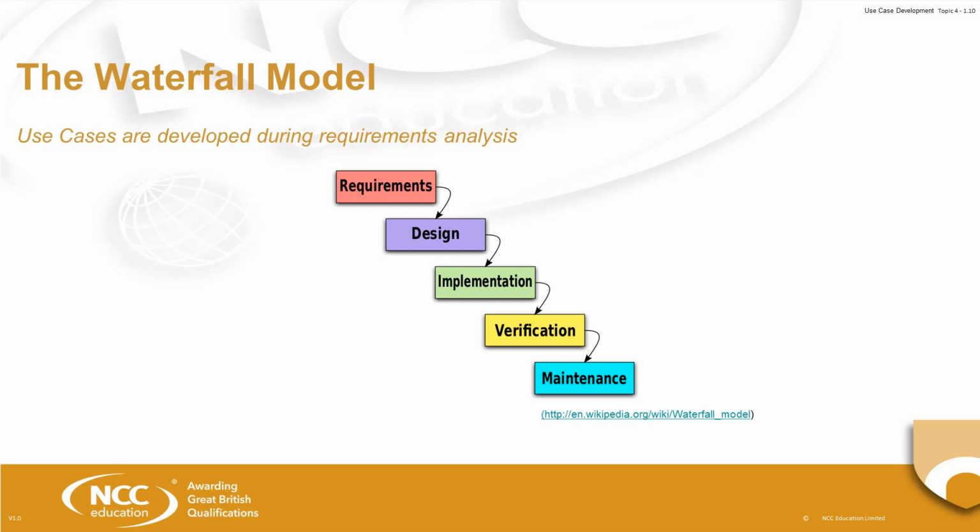Then, as I say, if you have time, then you can go through the requirements, design, implementation, verification, maintenance for the second level priority. That does add some complication because you've got to do some integration testing to make sure that the newly developed use cases do work, as well as not changing any of the functionality of the initial first priority use cases.